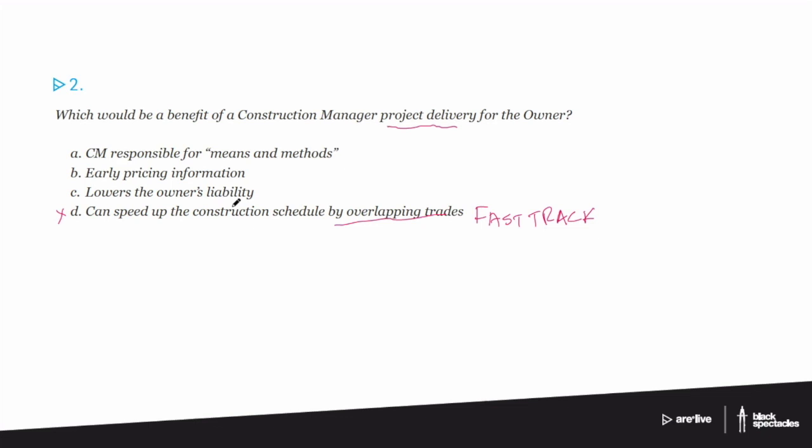There's a lot of different ways, different contracts will share some of that, but in general, they get to hold that money. But equally, if it comes in at $1.3 million, they just lost 100 grand. So they're taking the chance that they've figured out how to make the project go. So if the owner is hiring a construction manager, they are effectively saying, all right, we're going to take that responsibility and liability and have it in-house, meaning that if they save the money, they've saved that 100 grand for the owner.